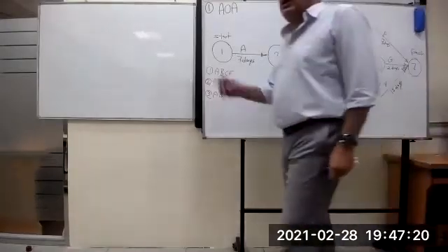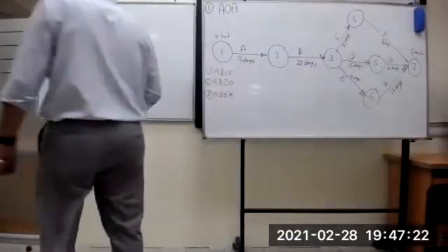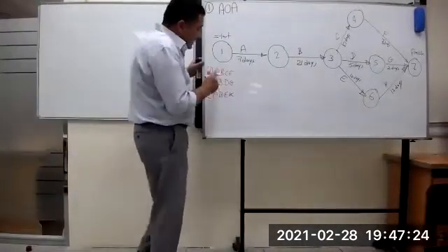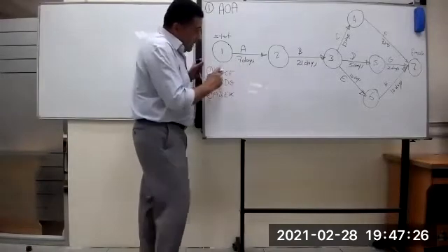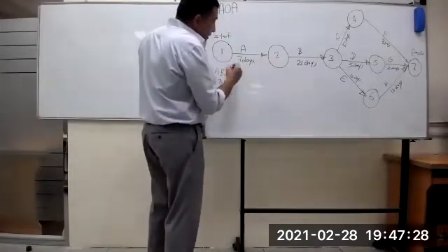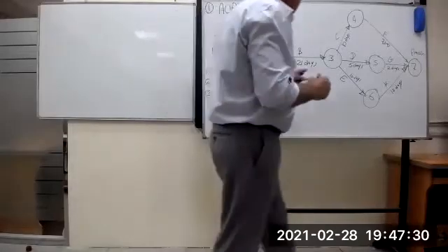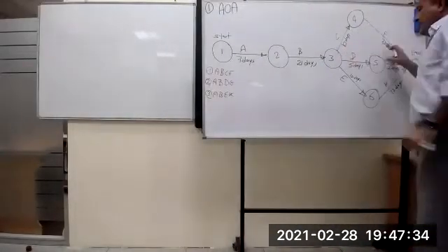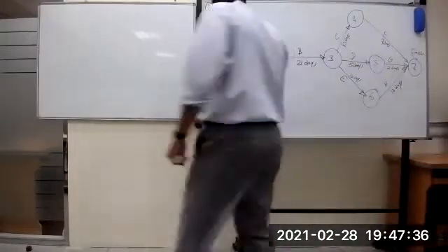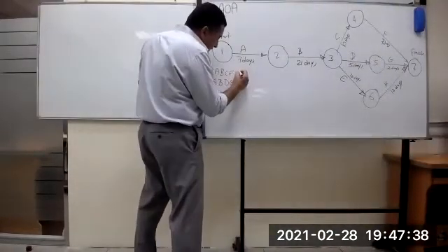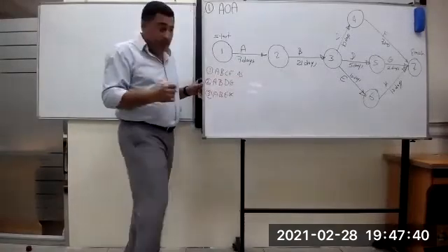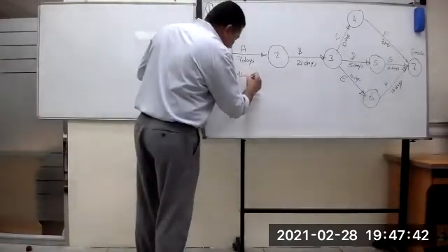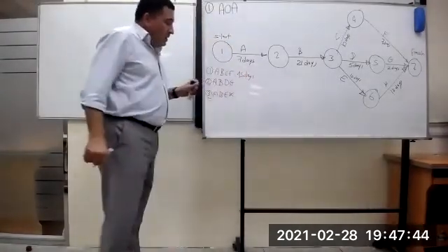How many total days for each route? Let us see. A 7, B 21, you got 28. 28 with C 10, you got 38. 38 and you got 45 days. This is 45. Correct, guys, or not? Yes, days. Correct. Please calculate with me.